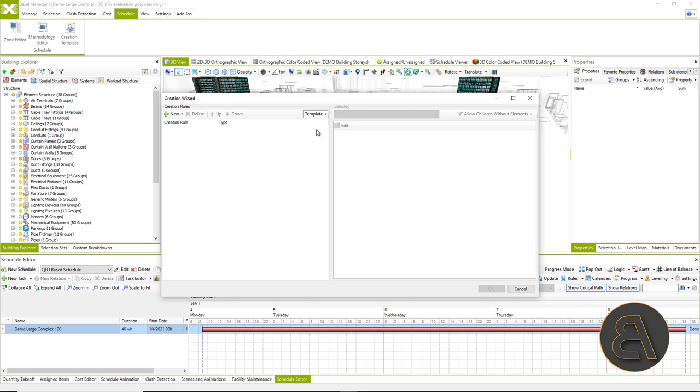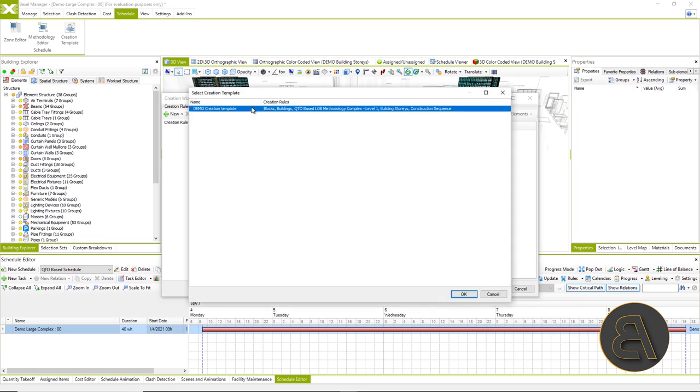And already during its creation, we connect the previously created structure with cost items. If we define prices, they will automatically be linked up and displayed in the activities of the dynamic plan.